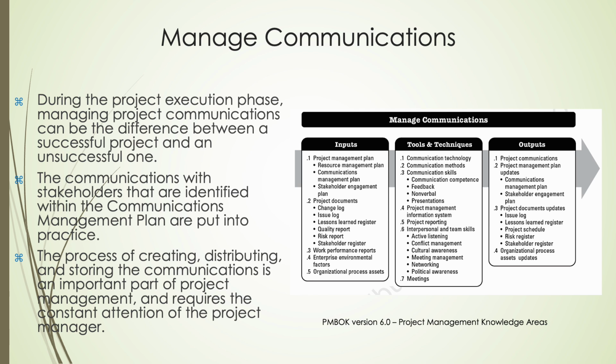The outputs of managing communications ensure that project communications are properly documented and updated, contributing to project transparency and stakeholder satisfaction. These outputs include updates to the communications management plan, stakeholder engagement plans, and critical project documents such as the issue log and risk register. A strong communications management approach not only keeps stakeholders informed but also strengthens project governance, collaboration, and trust throughout the project lifecycle.